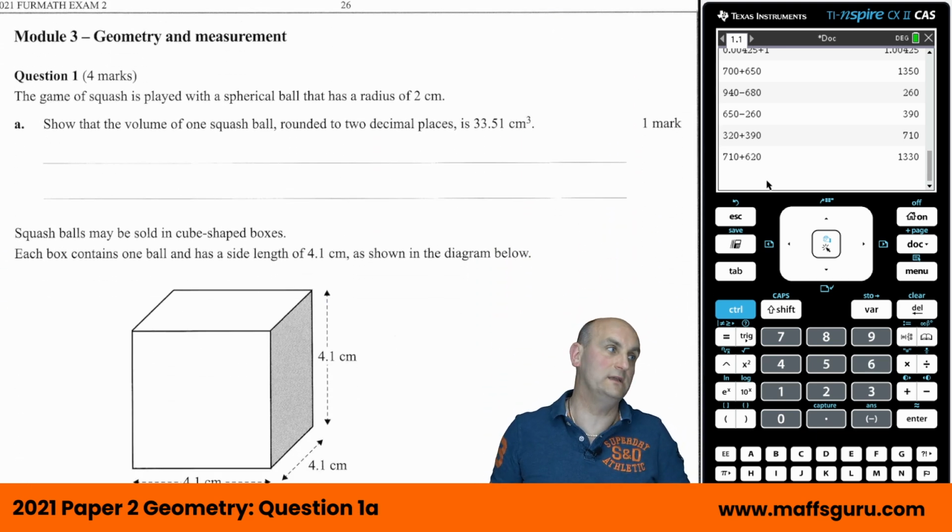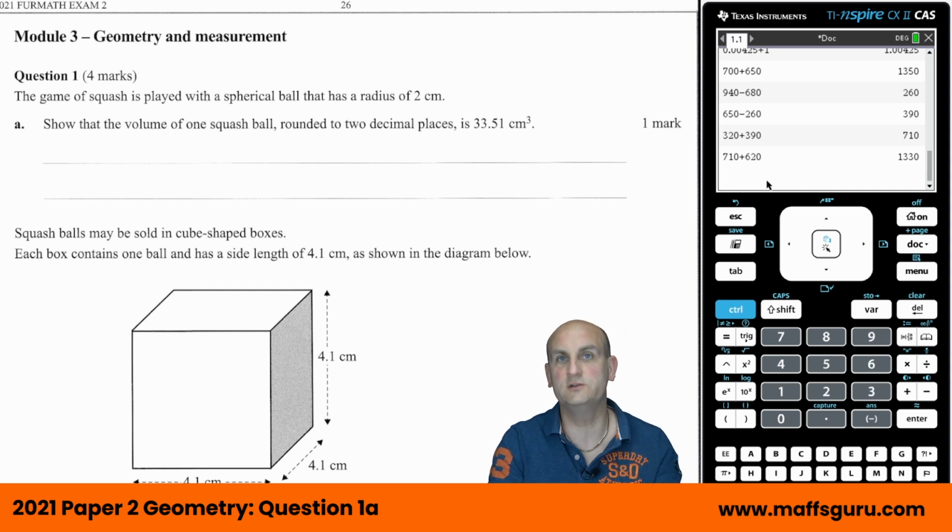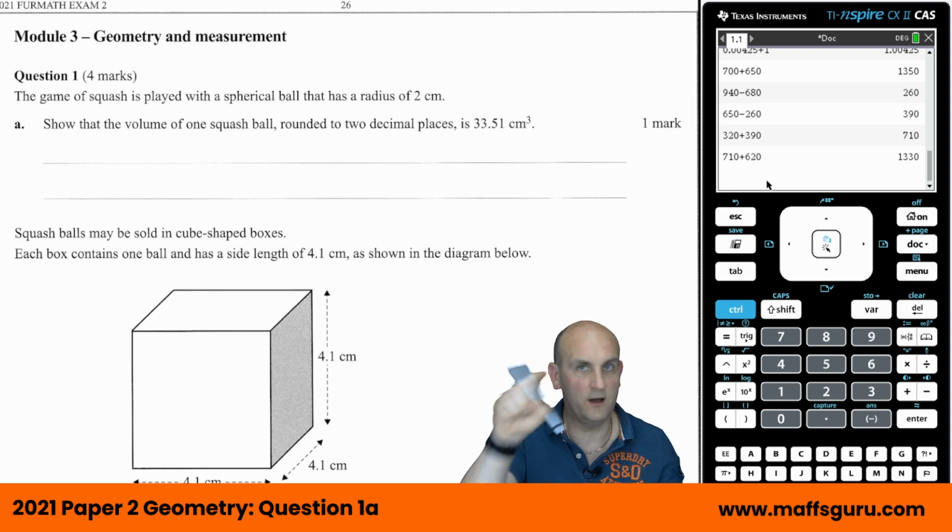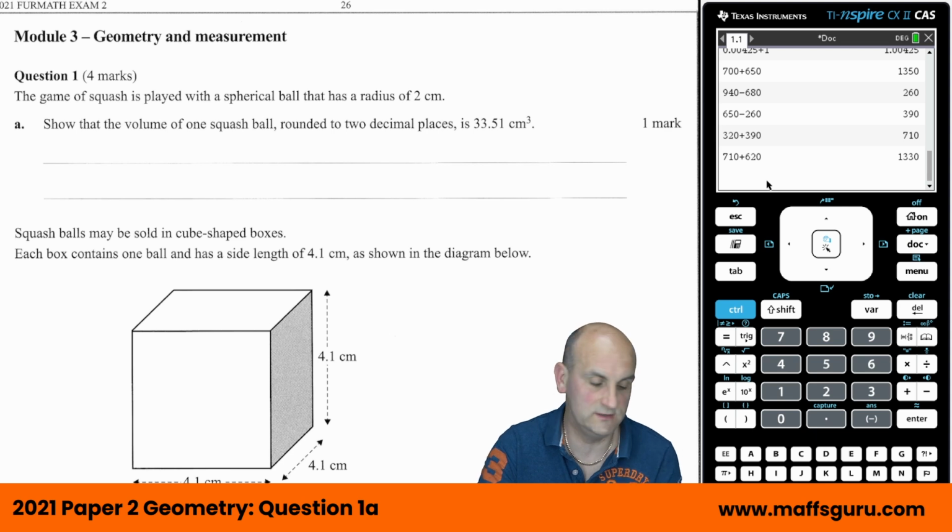That was quite challenging as well. I think probably one of the nicer crashing questions I've seen for a while. But again, if you're doing crashing questions, you just want to make sure that you keep the critical path. You look for all the paths through. And there are other ways of doing this question.